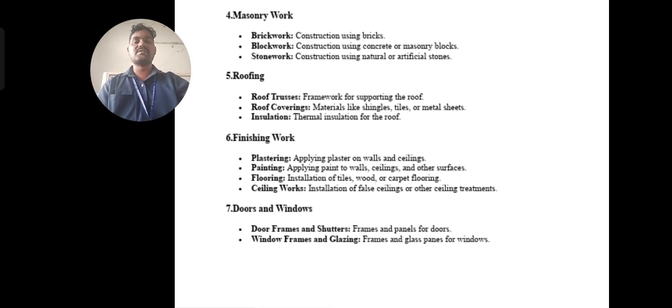In the finishing works, the next one is plastering. So plastering and painting, and there are flooring and ceiling works. So these are all called finishing works. If for example you take the plastering works, what is the material we are going to use for plastering? It's mortar. So in the case of mortar, we calculate the mortar quantity, and then we add the cost of the material required to prepare the mortar, plus the cost of the labor. Similarly, there is painting also.